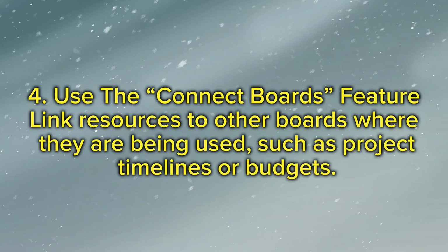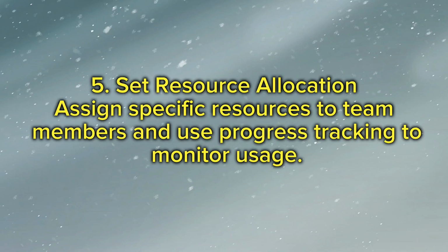4. Use the Connect Boards feature. Link resources to other boards where they are being used, such as project timelines or budgets. 5. Set resource allocation. Assign specific resources to team members and use progress tracking to monitor usage.